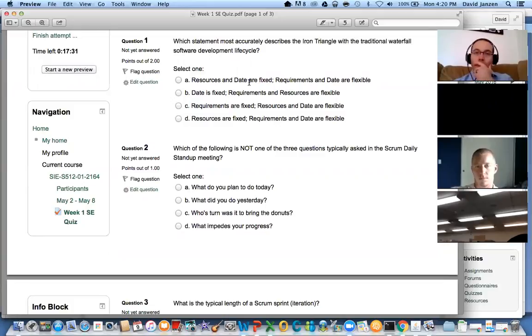That's the idea. I just today had somebody ask me, hey, can you give me an estimate on some consulting work for this summer? Well, it's really hard. They gave me just brief little information, high level, kind of abstract. How do I estimate that accurately? What are my options? Well, one option I have is I can give them a really high level estimate and say maybe it's plus or minus 1,000%. Oh, I think that'll take me about 4 weeks to do, maybe 160 hours, plus or minus 1,000%. If I know more detail, then I can make that a more accurate estimate, but